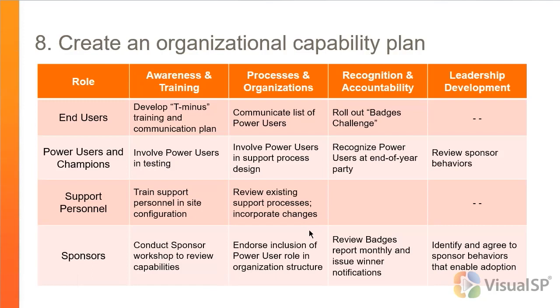For power users, I might need to get them involved earlier on in the process and be part of testing so that they learn the capability more thoroughly and are prepared to support the end users when they start to get involved. Support personnel may need advanced training and configuration, and sponsors might benefit from a short workshop in which we review the capabilities so they know what the possibilities are, and they can identify and recognize where SharePoint may fill a business need that they have had but they didn't know SharePoint could address.